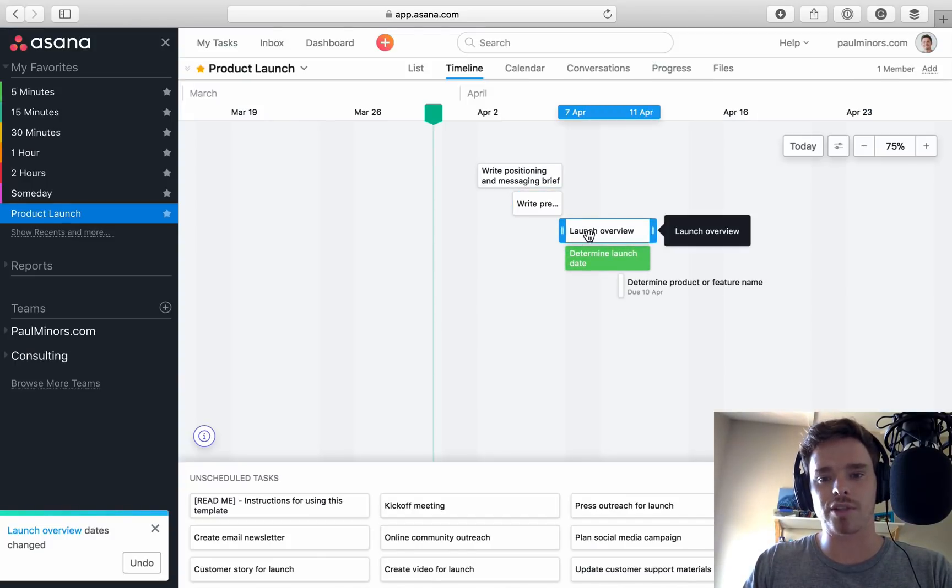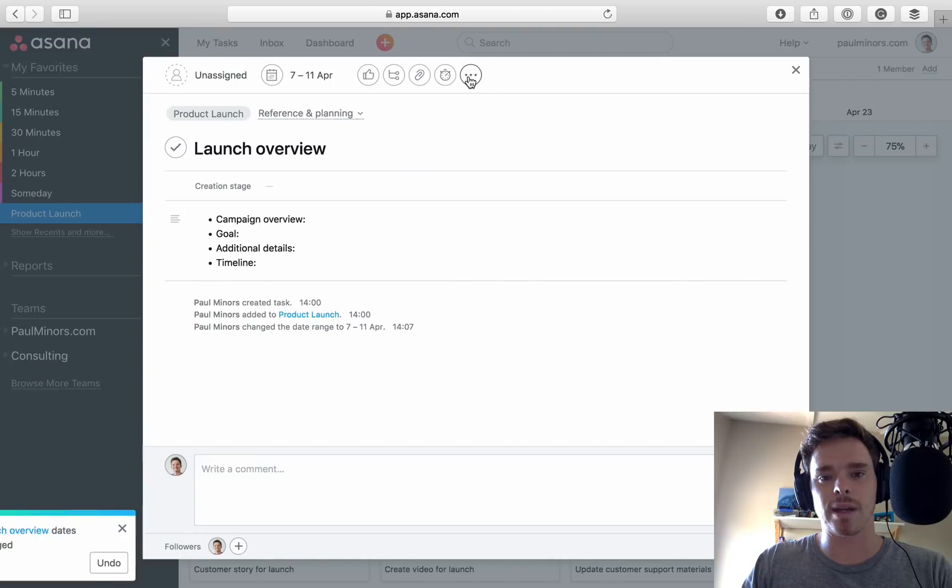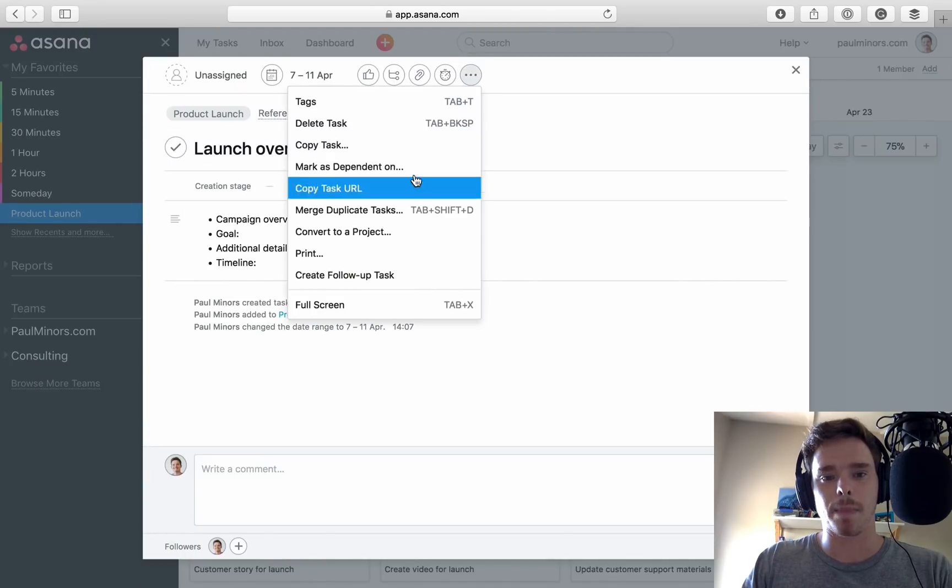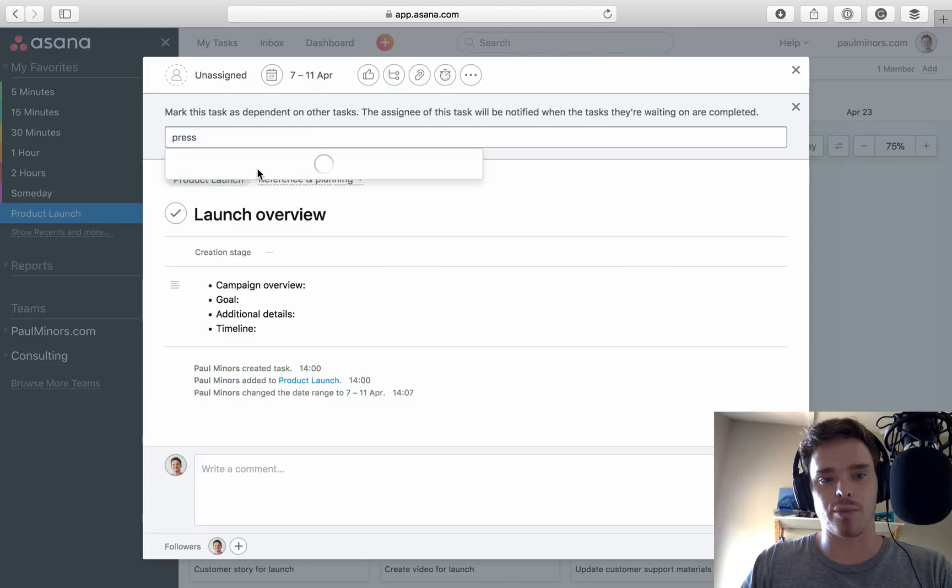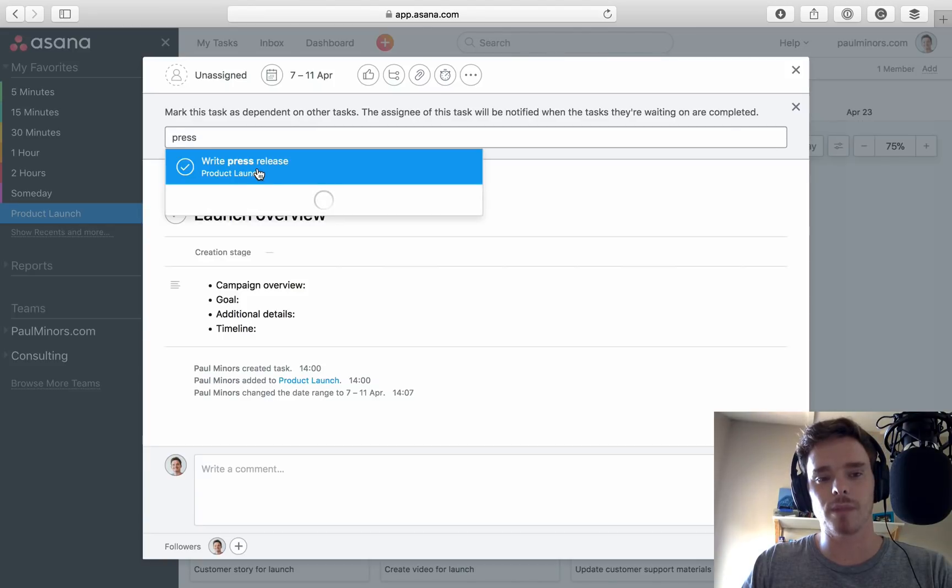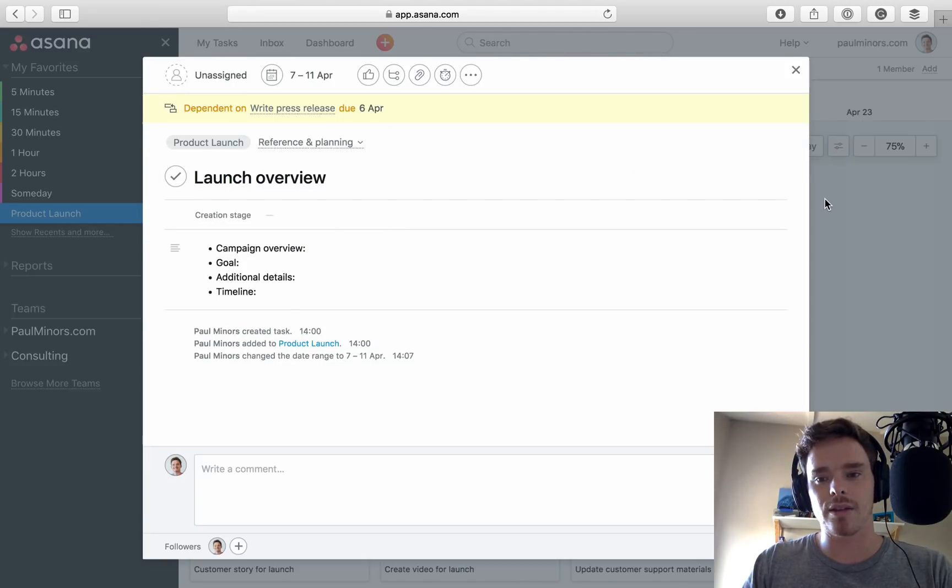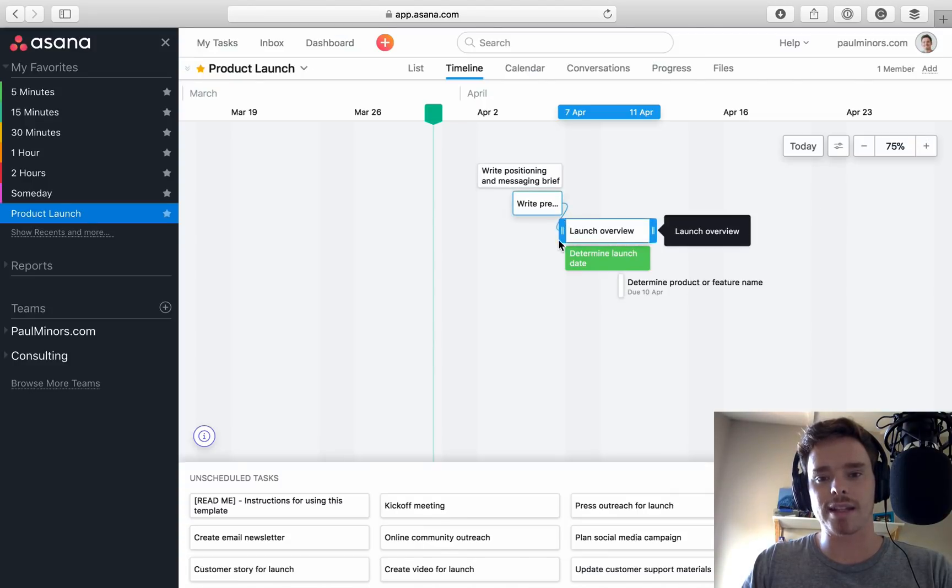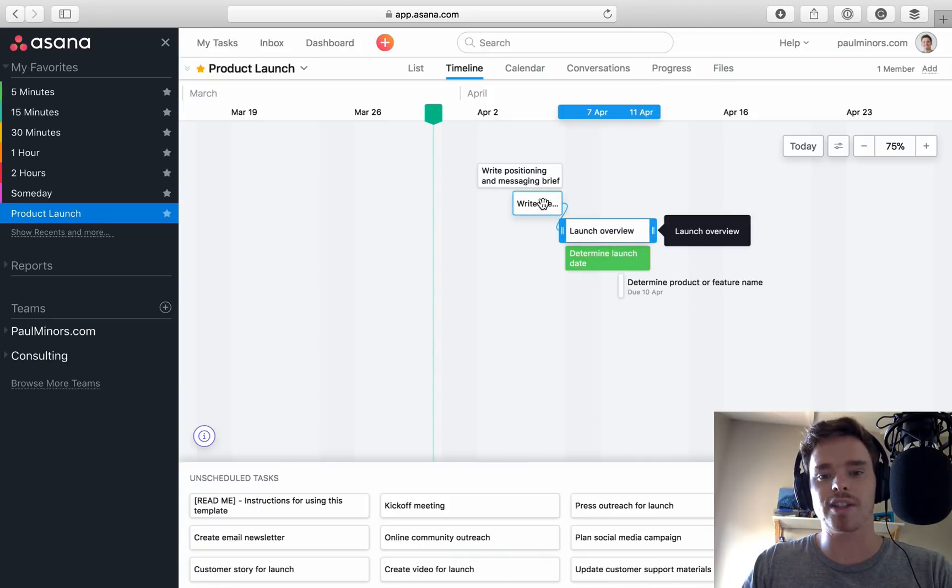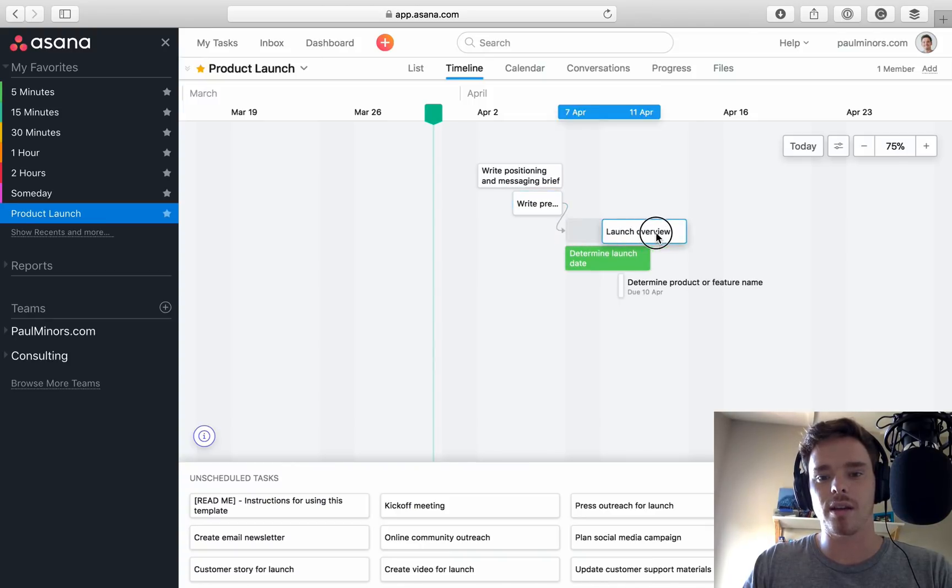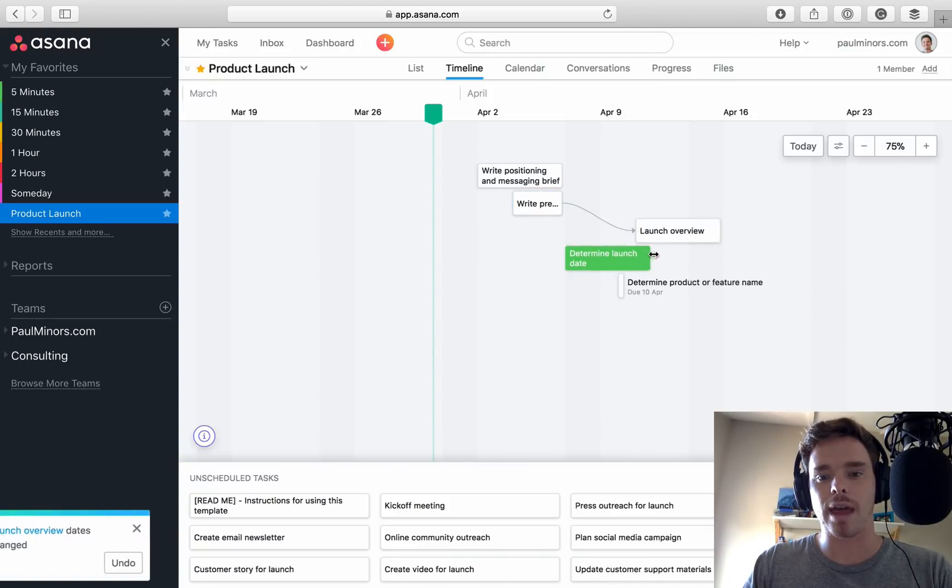So let's come up here, mark is dependent on press release. So I can type the word press. And you see it creates this little arrow here to show that this one is dependent on the press release. And I can move that there.